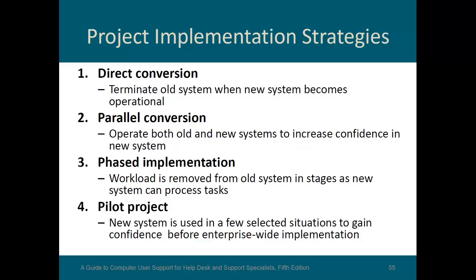Here are some strategies for implementation. Direct conversion, terminate old systems when new systems become operational. Parallel conversion, operate both old and new to increase confidence. Of course, it does require a lot more work to do it that way because you're entering data twice.